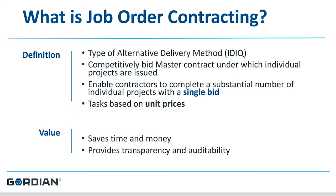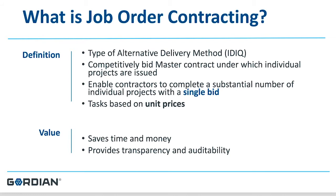Tasks in each one of the job order contracts are based on unit prices. Every unit price includes an allowance for labor, material, and equipment. The construction task catalog also has unit prices for the installation of an item and for the demolition of an item. The value proposition of job order contracting is that it saves the public agency that implements it both time and money.